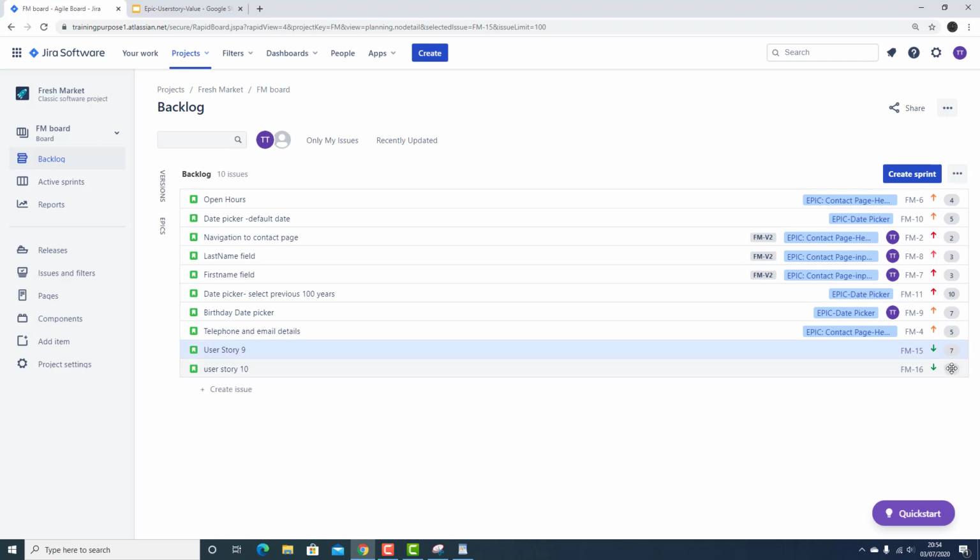So let's say we are aiming to achieve 10 or maybe 20 story points by the end of the sprint. That means we need to pick user stories which will add up to 20 story points. Okay, so how do you decide that? The Scrum Master will discuss with the entire dev team in the sprint planning meeting, and will check if the entire team is available for that sprint, and also discuss everyone's availability, like if anyone is going to go on a holiday or if anyone is busy working in some other projects.